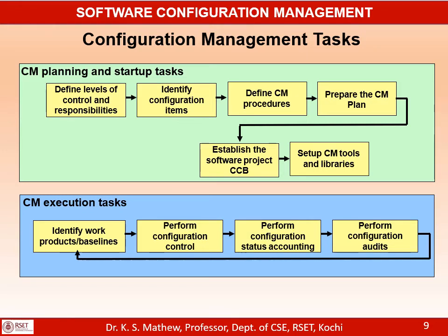Then establish the configuration control board, the CCB, which could consist of the project manager, the project leader, and the CMIC, the configuration manager in charge. There can also be representatives from the marketing department as well as the finance department, because when there is a change request, it can have an impact on the cost and the schedule of the project, which has to be negotiated with the customer.